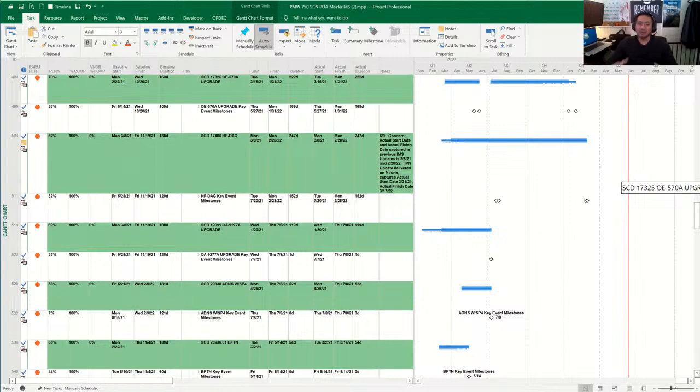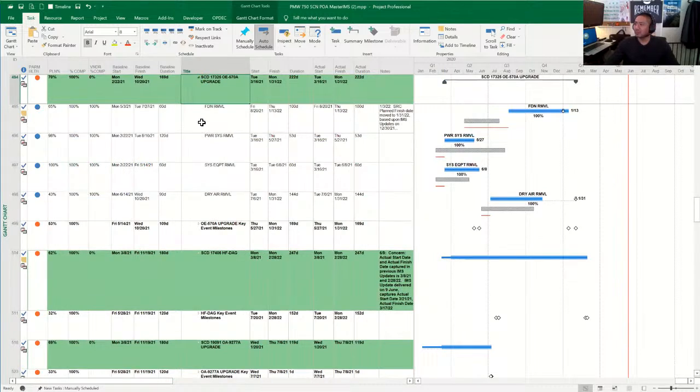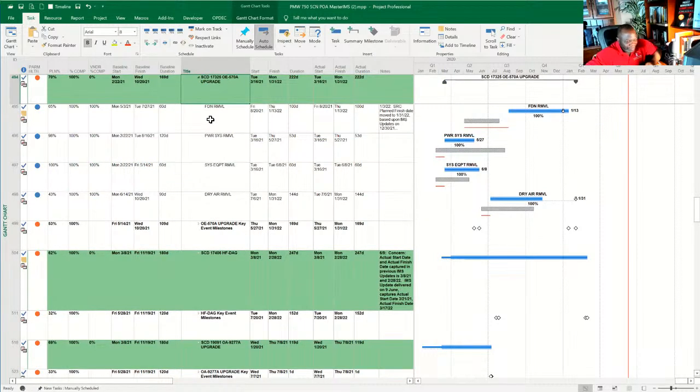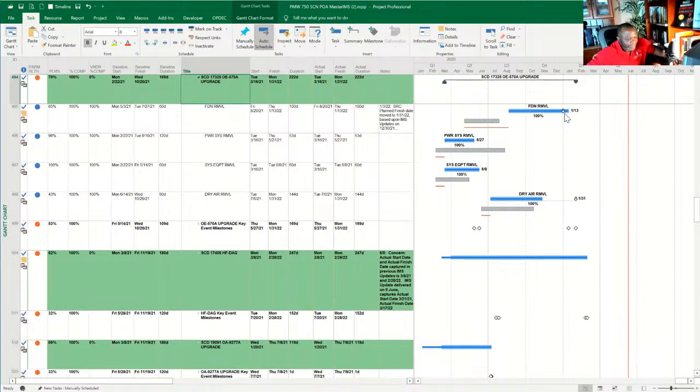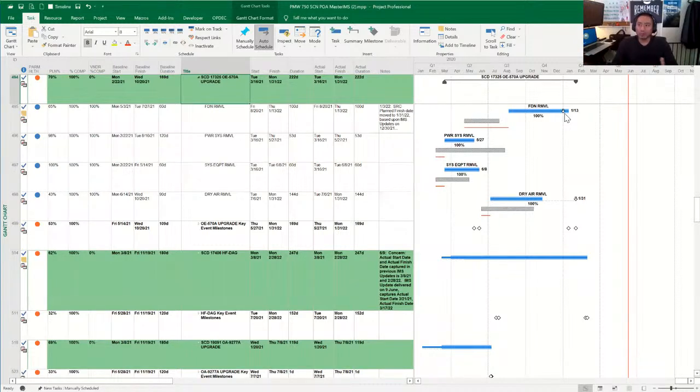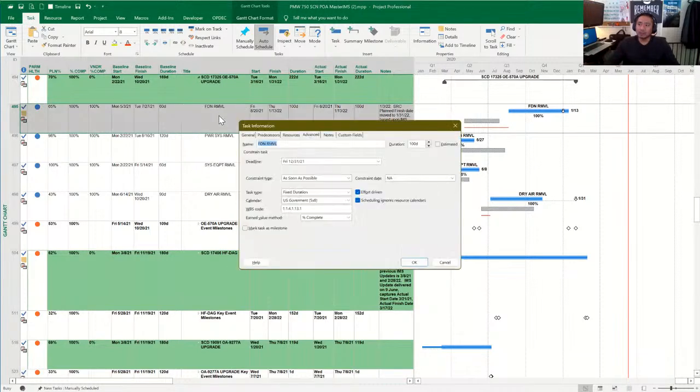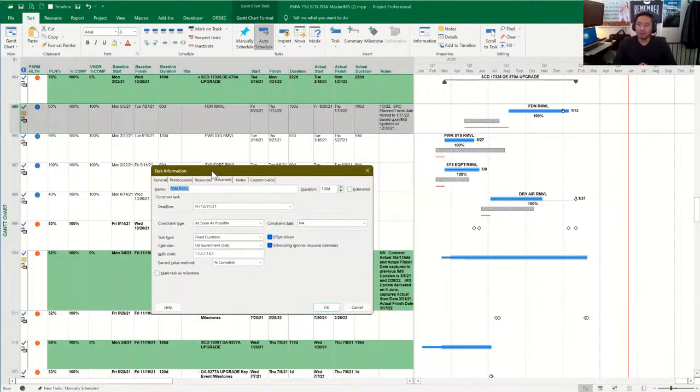Phil, this is an IMS or a schedule that's been completed. That's why you would have to add a new deadline. There you go. I just have to find it. So on the bar chart here, you see that arrow pointing down. That's called a deadline, and it's used as another way of using a lead and lag. By showing that, it keeps your critical path healthy, I guess, if you put it that way.